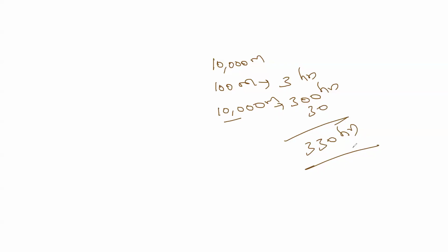We will take from there, like it will take 3 more hours or 4 more hours to complete. We have 30 hours as reserve time. From that, we'll take 4 hours and we'll remove the obstacle. That is reserve time. Same thing for cost. You will have a contingency cost as well.